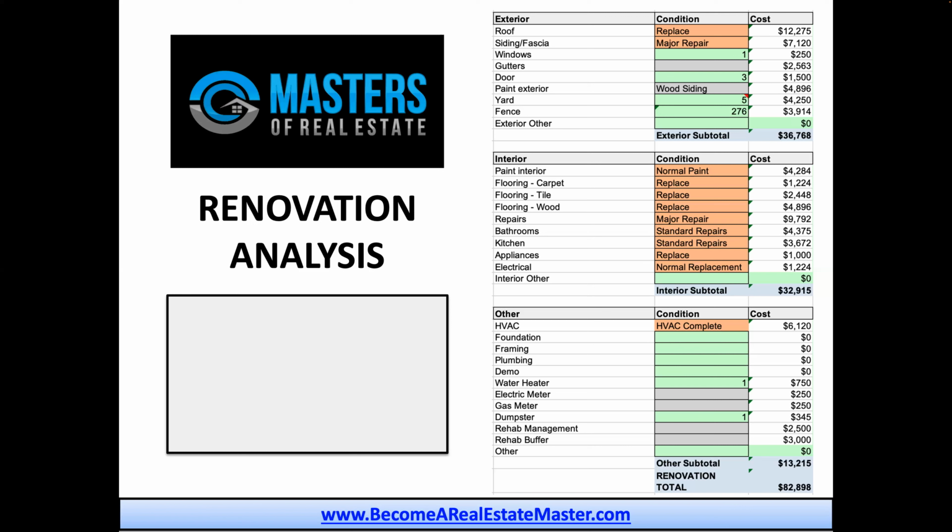Also, when you're getting renovation bids from contractors, you can determine, hey, is that in line with what I was expecting, or is this above budget or below budget? And can I get a breakdown of that bid in particular? If it's a roof and it comes in at 20,000 when you were expecting 12 to 14, why? Can you get extra quotes? What are the reasonings behind it? Are they using a certain type of material? Are they not using a certain material? Are they giving you a layover on a roof? All of those different things get worked out when you break things down this way.